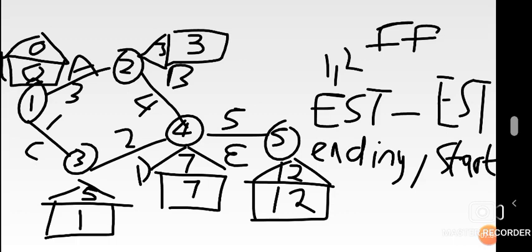So basically, it's just about the understanding there. We said you look at two nodes for the activity from 1 to 2. Which of those is the ending node? It's 2. The starting node is 1. So you get that subtraction. Then after you get that subtraction, you just say minus d, which is the duration. Earliest start time of ending node minus earliest start time of starting node minus the duration, and you'll be doing that for all your activities.